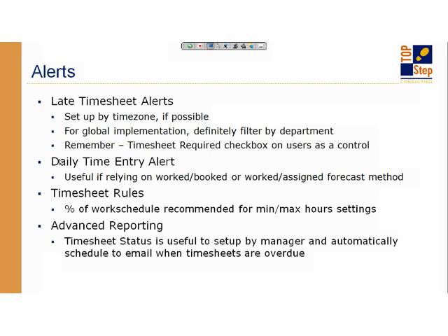So if you're not familiar with the forecasting, it's a feature that's under the project settings called charge projections. And under there you can configure what is driving your forecast. Two of the options involve worked hours, which means any hour on any timesheet, along with bookings, or a worked hour along with task assignments. So if you're doing a forecast with those worked hours, it is important for people to put their time on their timesheet every single day.